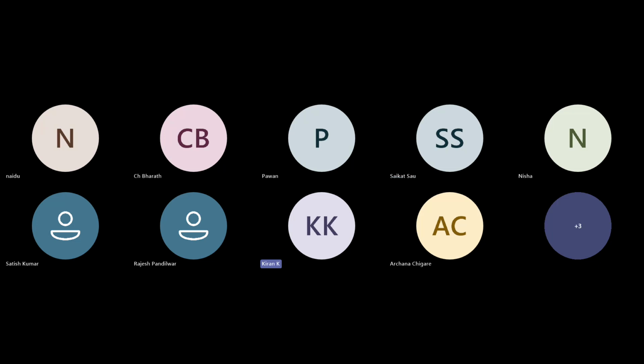See, for example, we have planned for four sprints. So first we will be delivering sprint one. That will be delivered with the basic features as we discussed, and we will be monitoring the performance, the response, and any issues from sprint one. Simultaneously, we will be developing sprint two. Once the timeline has ended, we will go for deployment and testing for sprint two.